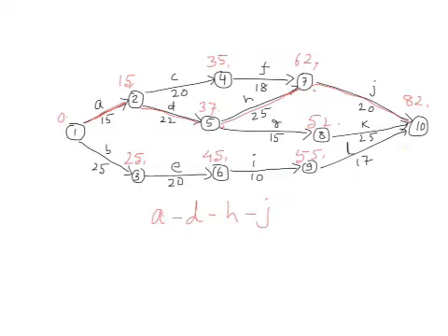It means that even if activity B is delayed by 7 days, you will be able to finish all these activities up to L by 79 days, and still you have 3 days extra in hand. It means that a delay in activity A is more serious.